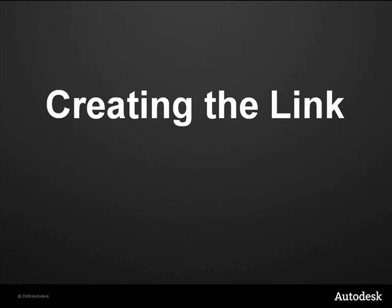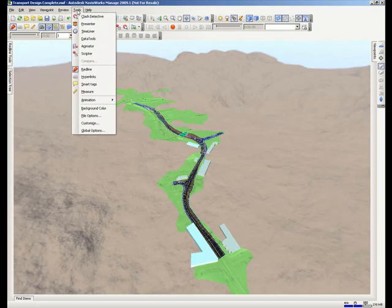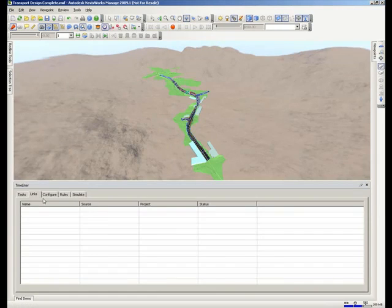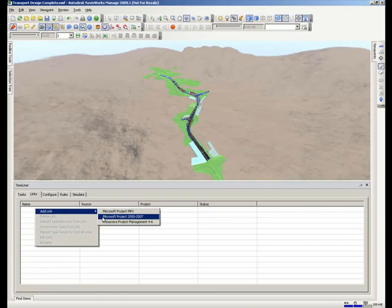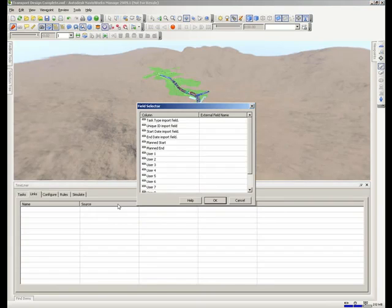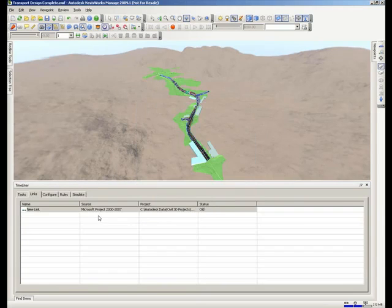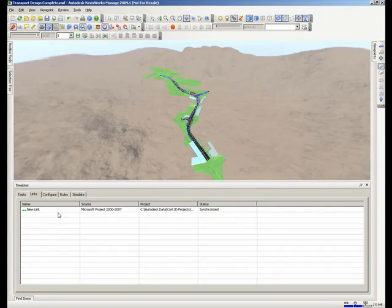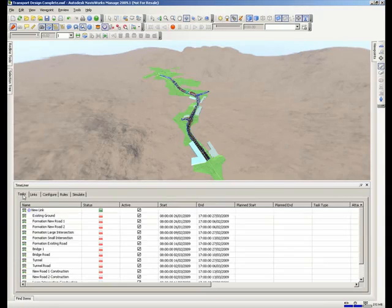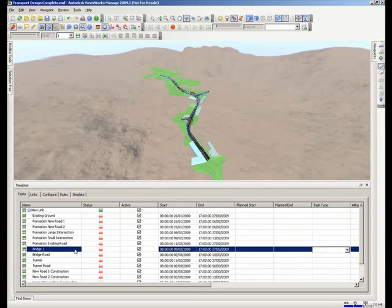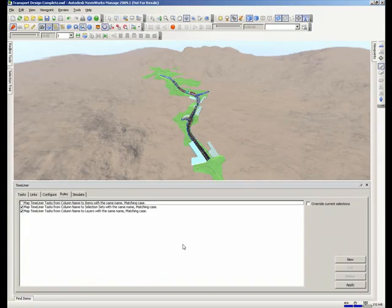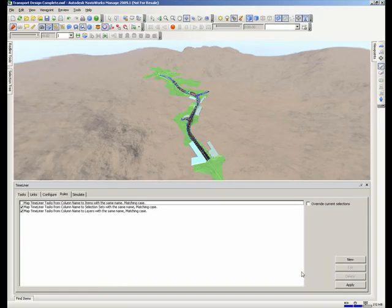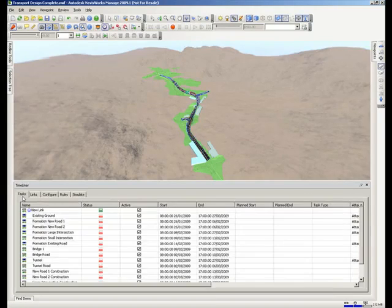We are now going to create the link from that Microsoft Project file. So we use the timeline functionality and build all the tasks from that file. You now see that all the tasks from the project file are now listed. From those layer names that we set in Civil 3D, we can automatically assign some of the objects automatically.